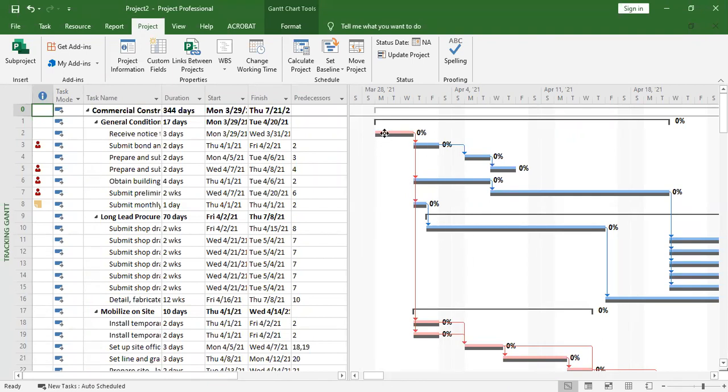In case of any changes to the plan, the bar will either go off or not reach the baseline, but we're going to see that. So we confirm the project schedule, then we set the baseline. Now we're going to mark progress, or update progress.